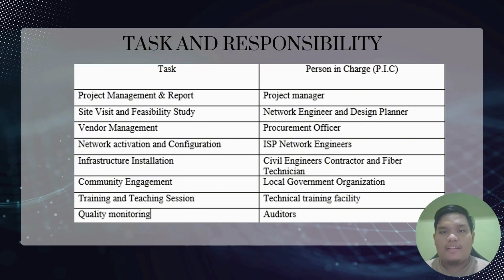And this is the task and responsibility. We have divided the tasks and the person in charge for each: project management to the project manager, site visit to the network engineer, vendor management to the procurement officer, network activation to the ISP network engineers, infrastructure installation to the civil engineers, community engagement to the local government organisation. Training sessions are technical training to help maintain the facility in our project. And the last one is quality monitoring by the auditors.